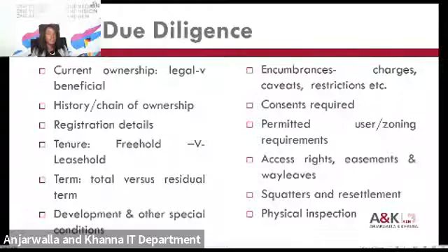And the other members of the community then challenged the acquisition of those land rights because the community said they were not well represented and they were not consulted, and that the terms and conditions upon which their perceived representatives had agreed with the project company were not acceptable to the community. And then this delayed the implementation of the project because the rest of the community then went and put caveats against the land, and the project company could not proceed with the project. And they were then forced to commence negotiations with the other members of the community, even though some money had already passed hands to the perceived representatives of that community.